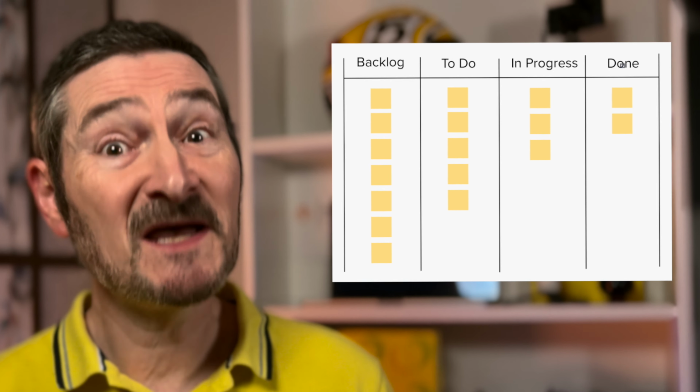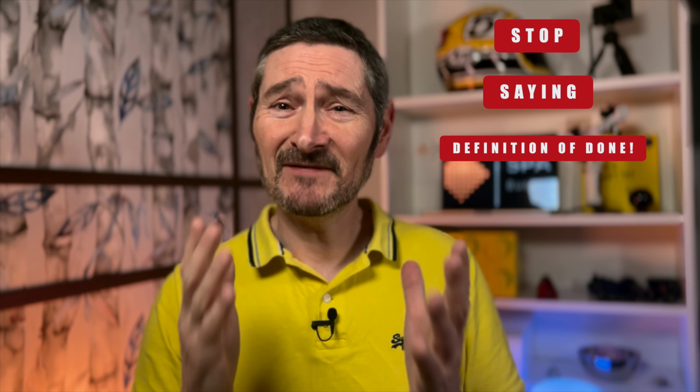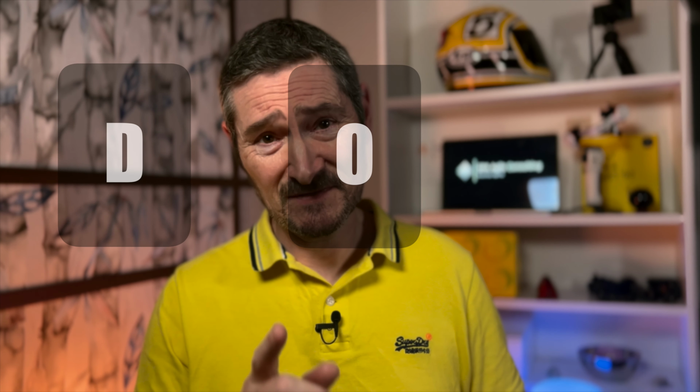I'm sure you have a done column listed on your Scrum or Kanban board. Well, the definition of done, do you know what? I'm going to stop saying that, it's getting very irritating. I'm just going to call it DOD. So the DOD is what needs to be satisfied in order for you to move it into that column, not simply passing the acceptance criteria.